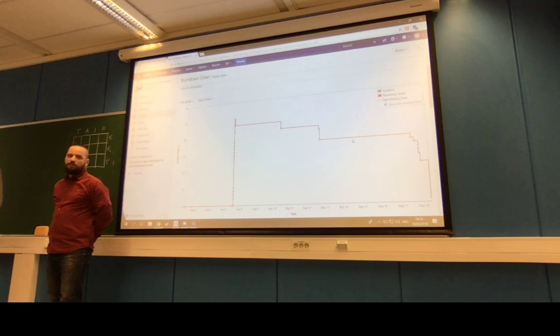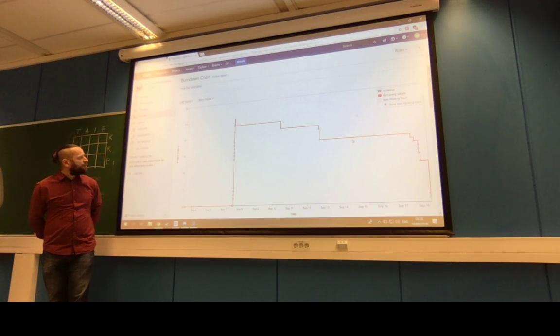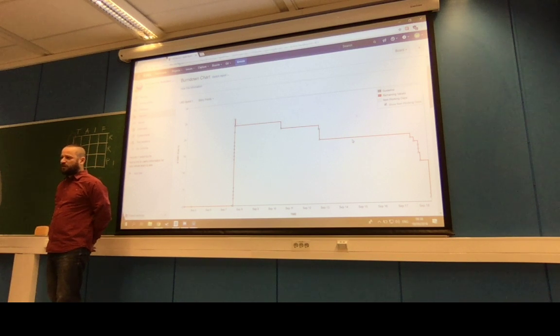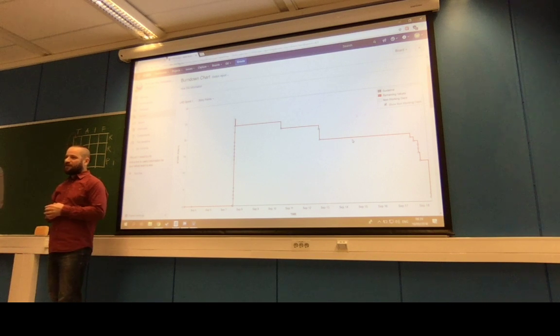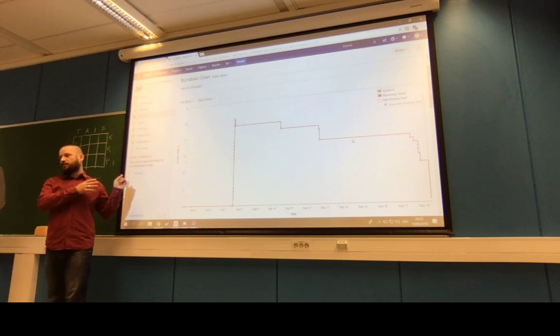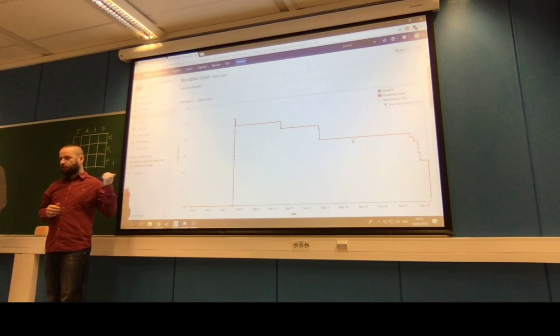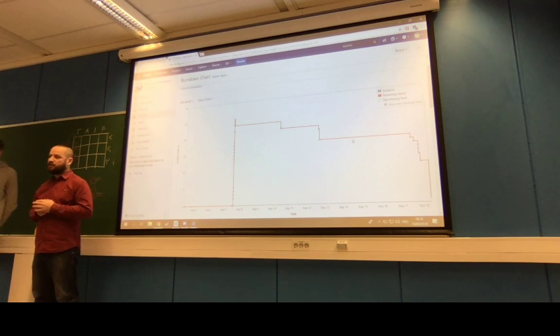Probably, because now we are using like 25. We thought about 25 story points for 5 people, but it might be too much if we include the meetings and all the other stuff that are not here in the issues. Then it will probably go down to 4 story points if we're keeping this just for the tasks that are inside the Jira issues, but we have to discuss a little bit about this.